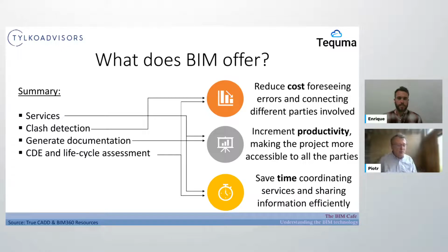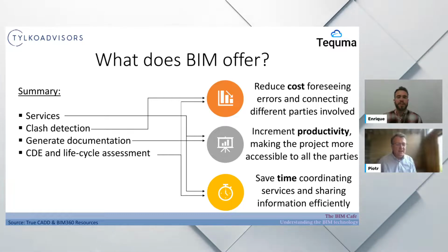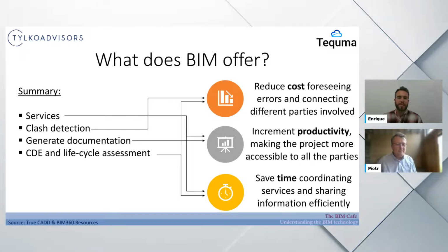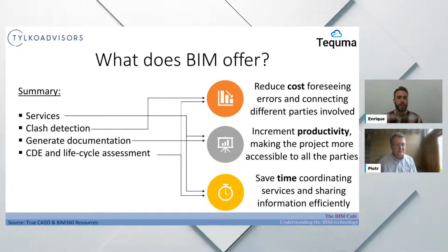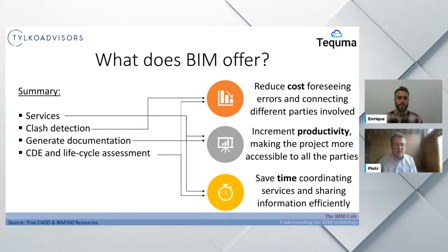What kind of coordination you need, what type of steps. So I think that's fair. That's fair, completely. Let's say if BIM projects on average save you 25% of the time, you're not going to take this 25% on your first BIM project. You need training. You need to get the people knowing about this and learn about the workflows, and slowly you will get there. Very good.